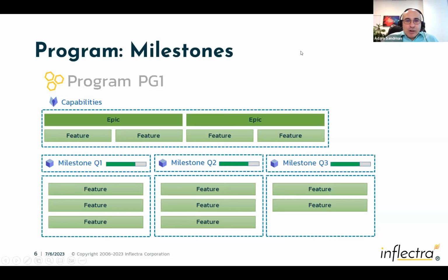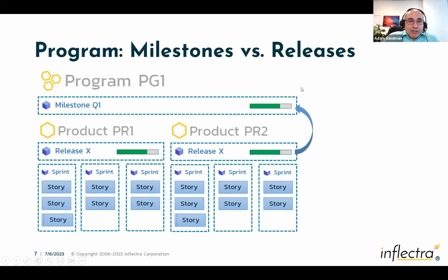We do need to know, how does that affect the planning at the project level? So we do then link the releases, and you can link releases and sprints to a milestone. And that lets you see if someone moves the release date out, it will obviously impact the milestone. Because again, it's a loose coupling. We deliberately said we don't want to have it so that if the project manager, or the program manager, moves the milestone in by a week, that suddenly all the products have 1 less week. That's not an agile approach. That's an anti-pattern. What we're doing there is micromanagement.